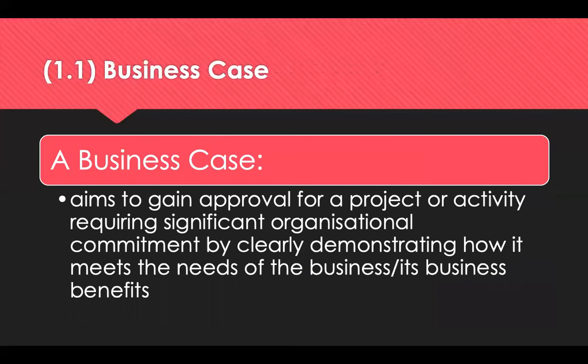So what do we mean by a business case? For large-scale procurements, a formal feasibility study with a cost-benefit analysis or a business case may be required. And your procurement policies will often state when these are required. For example, it must be presented if it's over a certain value.